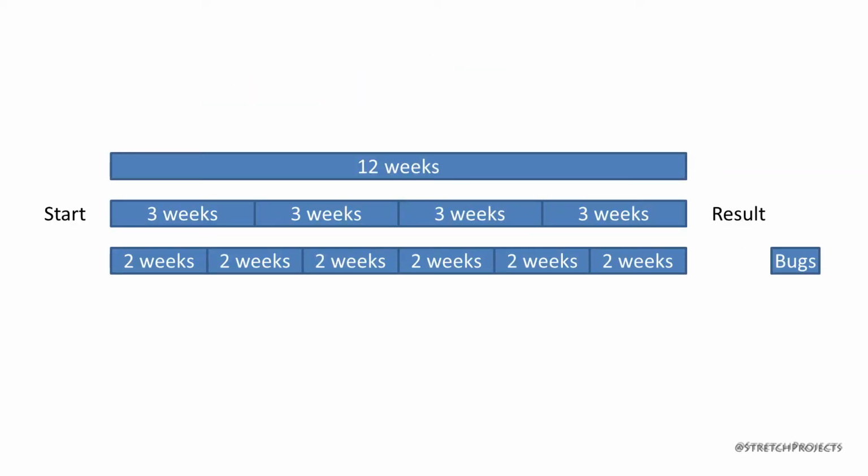On most occasions, there will normally be a window where the product owner can contact the project manager and discuss any bugs which have been created as a result of the migration into the live environment. This isn't time that can be spent adding new functionality. It's intended to only be used to actually resolve those bugs, which invariably do pop up.